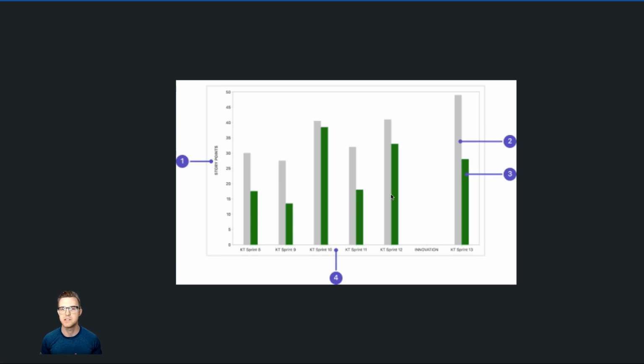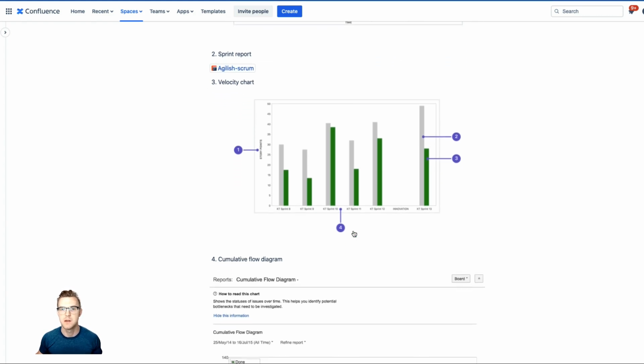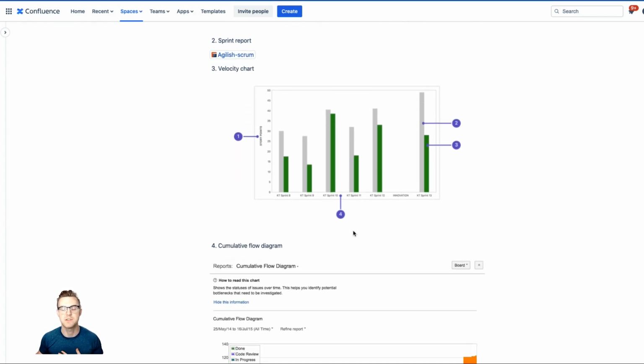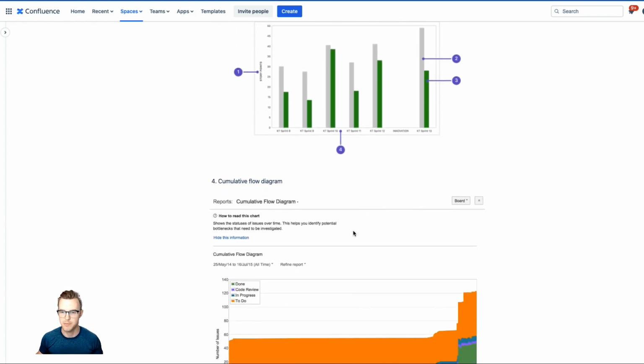The idea here is that you get this closer. The committed to completed percentage is something that I track and something that Jira automatically tracks for you. So I would take a look at this. This is a good predictability measure, right? The team says they're going to do something. How confident are you of actually completing that? So you can report to your managers, your VPs, your directors, that yes, with confidence you can complete this. So another important metric here for Agile program managers.